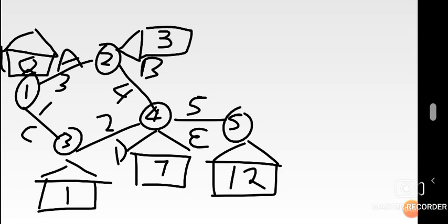We are on node 4. Node 4 had a value of 7. Going to 5, there's that duration of 5 which we've looked at. 7 plus 5, 12. Completion time, how do you get it? As of the last node, the earliest start time is always equal to the latest completion time. That's what we're now putting in the heart-like structure. Or going backwards, 12 minus 5, 7.